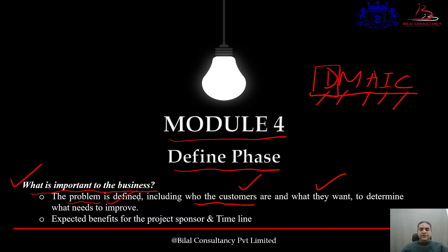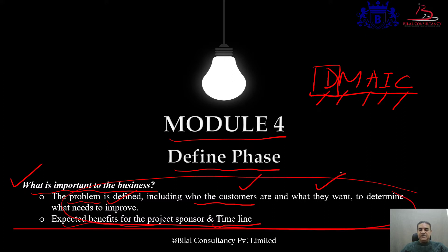Furthermore, we try to answer what the expected benefit of this particular project would be, in terms of financials and in terms of customer satisfaction. For example, if the customer satisfaction level is currently 70% and we want to improve it to 80% or 90%. We also try to answer how long it would take to complete this particular project. We capture all these things in the Define phase: identifying the customer, their requirements, the financial benefit, the satisfaction level increase, and the project timeline.